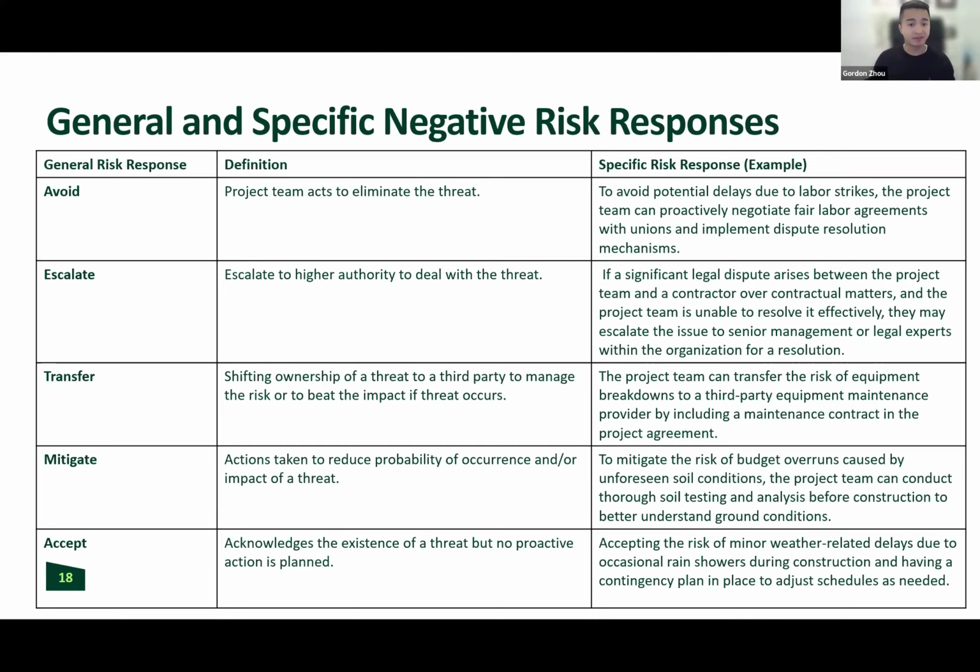And you can see, if they get tied off, it reduces the impact. Instead of falling to the floor, they fall a certain distance, or they don't fall at all because they're tied off. If there's a safety program in place, everyone understands protocol, everyone understands what good safety practice looks like, hopefully reducing the probability of it even occurring in the first place.